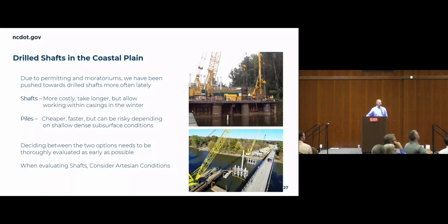So drilled shafts, as most of you know that are involved in project development or design or construction, we deal a lot more with our permitting and our moratoriums, and we have very limited times that we can actually work in the water in a lot of these places. Sometimes just a matter of a few months, 3, 4, or 5 months. And so that really makes it difficult if you have a lot of piles to drive because you don't have a whole lot of time to drive those piles.